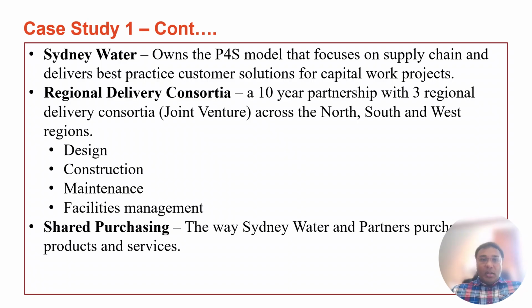This model uses regional delivery consortia, a long-term partnership with multiple organizations for design, construction, maintenance, and facility management. By sharing purchasing power and aligning incentives, Sydney Water achieves efficiency and improved customer outcomes. This illustrates how strategic procurement can drive value beyond just cost saving.